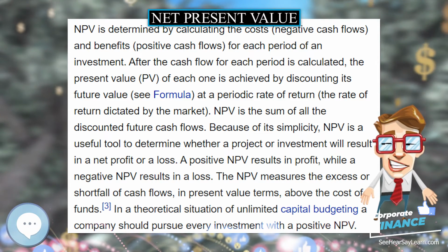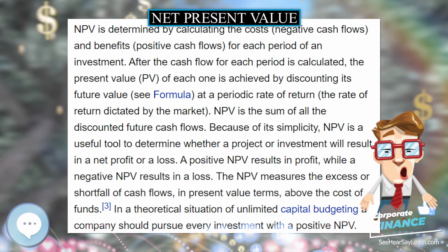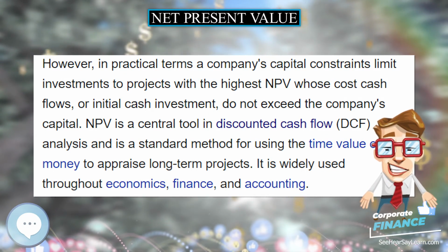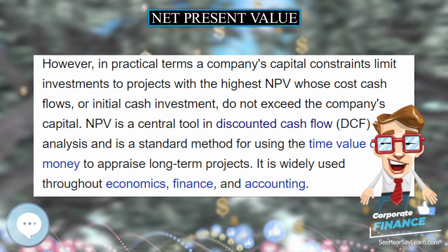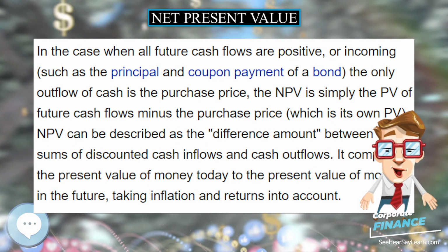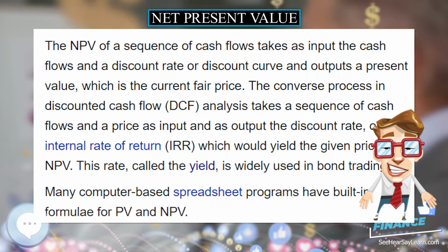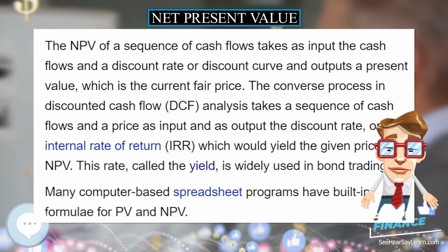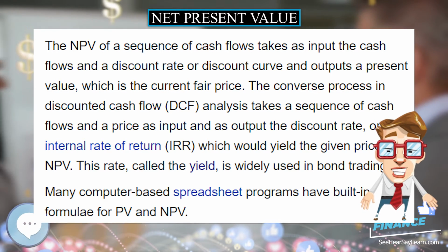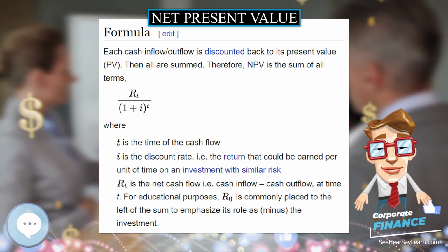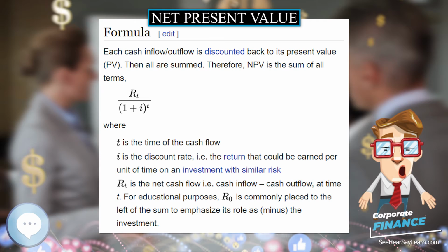The importance of NPV becomes clear in this instance. Although the incoming cash flows, 10,000 times 12 equals 120,000, appear to exceed the outgoing cash flow, 100,000, the future cash flows are not adjusted using the discount rate. Thus, the project appears misleadingly profitable.